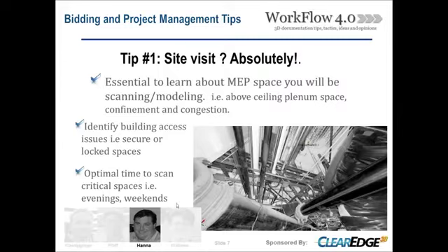Other important areas would be to understand the area you're trying to get to. Do you have access to those maybe secure spaces in the building? We do a lot of hospitals, and naturally, some areas they don't want scanners running around in during operational time. So we have to work with the staff and the facilities department to determine times to get into those critical spaces. Oftentimes our crews are working at night or weekends. It might seem obvious, but it's very important.